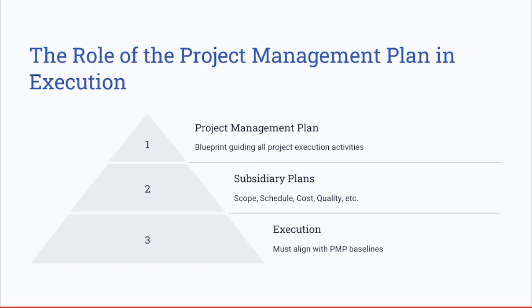For example, in a software development project, let's say the project management plan defines the coding standards, delivery timelines, resource allocation, and risk mitigation strategies. If execution deviates from the plan by adding, for example, extra features that put the project at risk in terms of complexity, or add extra time to the timeline, needing more resources to be allocated to complete the project, it can cause, for example, a missed development milestone. So the project manager must take corrective action to realign the efforts.